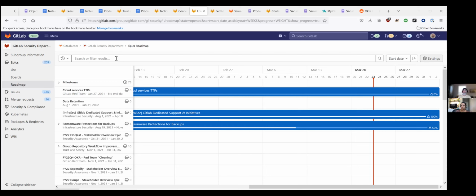Understood. Yeah, so having those different levels of granularity, so to say, in the views, and being able to almost adjust that, where one of them may be more higher level and there's clicks down, so to say. And then the last thing that it sounds like would be the lighter feature would be comparing snapshots in time for deltas, right? Like, yeah, to see this used to have a due date of a month ago. A month ago it was 3 months out, now it's 6, being able to quickly flag that.